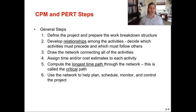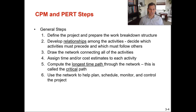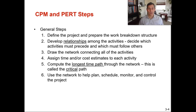Step three is to draw the network connecting all the activities. We'll go over an AON network diagram, but you want to visually see how those steps are all interlinked. Step four is to assign time or cost estimates to each activity — when you're doing this in your career you'll need to gather those estimates; in this class they will be given to you.